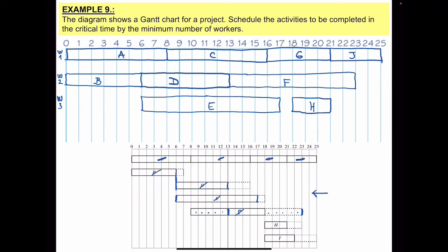Is the H. And you can also see that when I move the I activity 1, 2, 3, and then 1, 2, 3, so that starts here. So when H is finished, then I have 4 units reserved for the I activity. That means here. Sometimes what you can do is to shade this space here. This would be the place or the time when the worker 3 would not be active. So it's not required to be there.